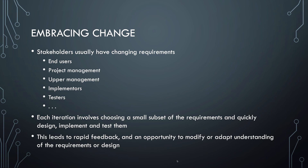These changes actually happen pretty often. Stakeholders that use the software change their minds all the time. An end user may prefer a different feature set after trying the project. The management team may decide that the company is going into a different direction, so their requirements change. Software developers may discover a technical limitation that changes the design and so on. This is why each iteration chooses a few requirements and then implements them — this way you get feedback quickly and have an opportunity to use what you've learned to adapt the process.